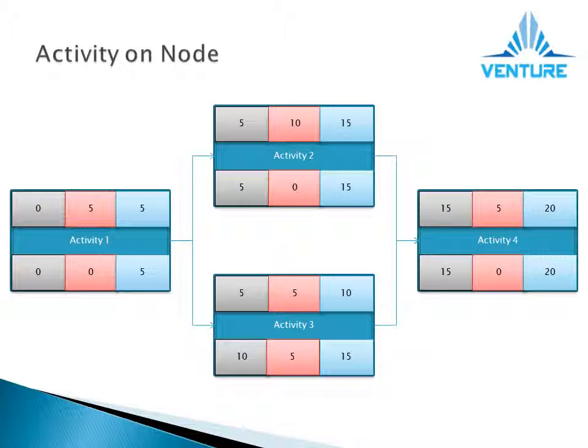This makes activity 1 a predecessor to activities 2 and 3, something the activities rely on being completed before they can begin. A real-world example would be that you cannot decide on a project (2) and assign job roles (3) until initial research has taken place, i.e. 1. The arrows in the diagram show the movement of work, so we work through the tasks from left to right.